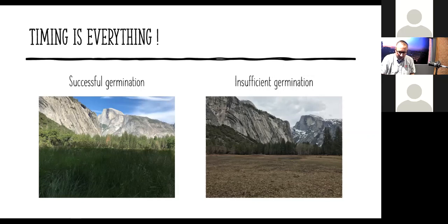And in this case, lots of times they try to do the meadow restoration just starting about now, the reason is that a lot of things are now dormant. There's less sensitive species to deal with, and there's less environmental restrictions right now.